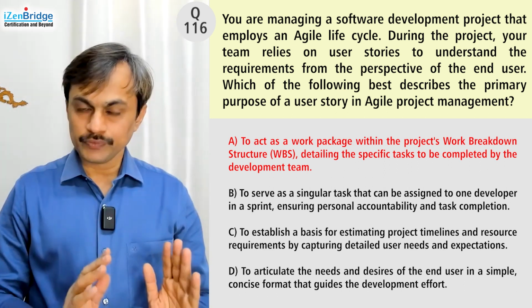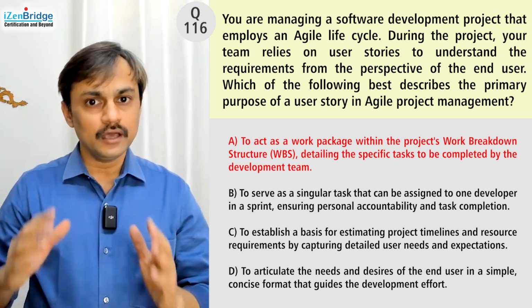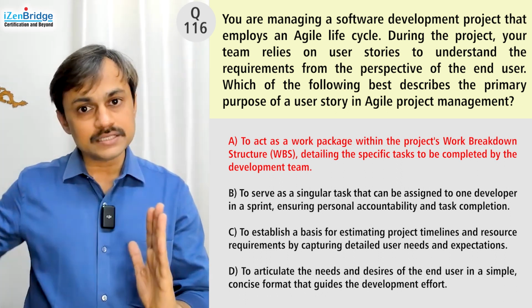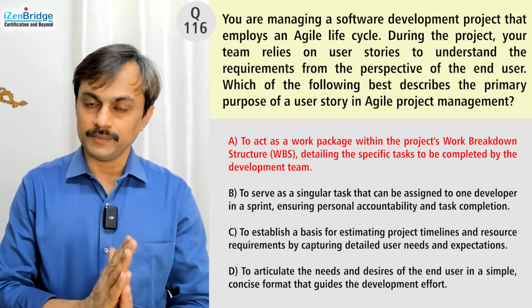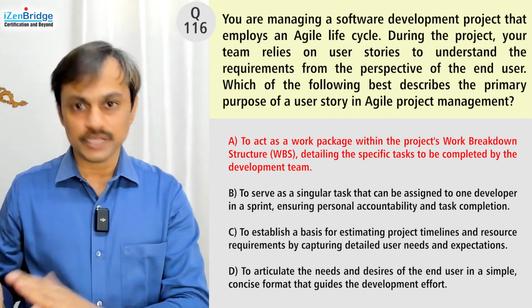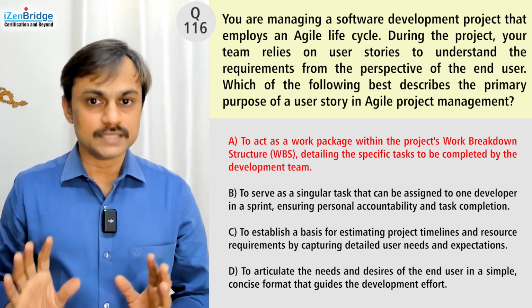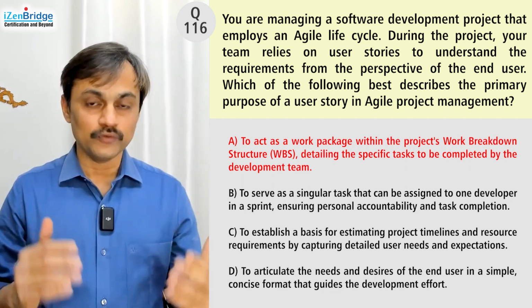The answer is no. You may think that user story also gets decomposed progressively, but it is not something which is planned in a hierarchical manner. It is refined continuously and prioritized with the help of product backlog refinement. So I should not equate work breakdown structure elements with a user story. So it is not a WBS element. I go with option B.